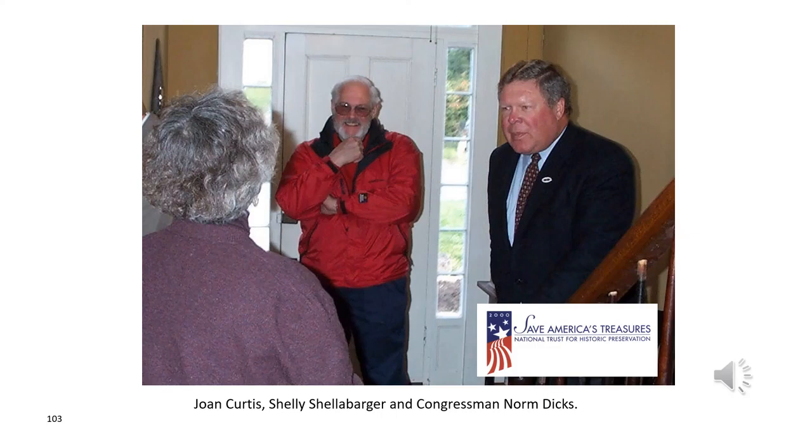I mentioned that we had expanded the project from about a $500,000 restoration of the Orr home to include the museum, and that along with site improvements to bring it up to ADA standards brought it up to a $1 million project. Well, the process of raising that money is another subject altogether. But briefly, it was accomplished with great assistance from Congressman Norm Dicks, who early on assisted in providing $250,000 from the Save America's Treasures program that was underway at that time.